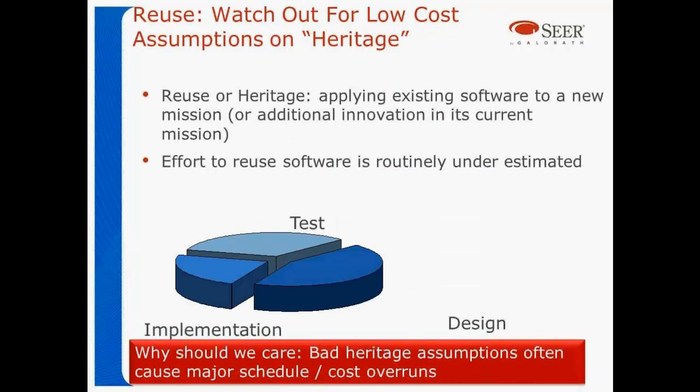One of the other areas where people often get in trouble is on reused software. They assume, again, it's going to be fine. There's a significant retest effort in reusing software, whether it's off-the-shelf software or internal software, as well as having to redesign it and re-implement it, looking back into it and re-architecting it to make it work with a new system. So another lesson learned is to watch when somebody says, oh, it's reused, it's going to be free or cheap. We've got problems. Next slide.